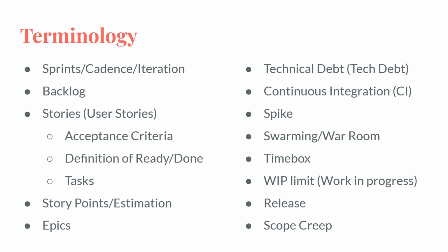You would start off by writing the ticket as saying, as a user, I need blank because blank. And instead of user, sometimes you may talk about a specific user or a group of users. So you can say, as a seller on eBay, I need to see a dashboard of all previous sales so that I know what I should sell more of.